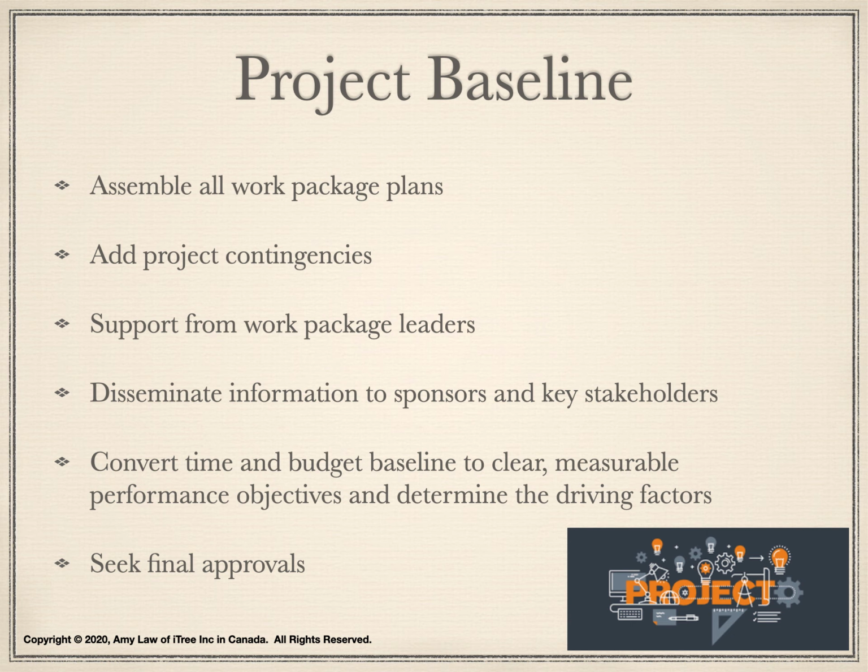We can convert time and budget baseline to clear, measurable performance objectives and determine driving factors. The baseline should be approved by functional managers and sponsors. Should there be any changes later on in the project, the baseline shall be adjusted after approval to the change request.